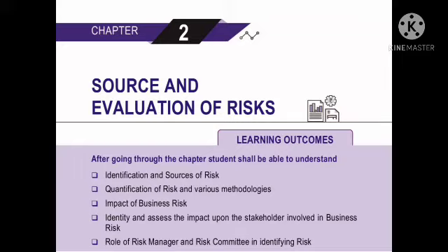2.7 Using the decision-making tree for this risk assessment, the data for the entire tree has to be processed and calculated. The procedure for calculating this is: probability of public event in good weather plus probability of public event in bad weather, i.e. good conditions plus bad conditions, equals 0.40 x 0.70 plus 0.60 x 0.30 equals 0.28 plus 0.18 equals 0.46. This can also be translated as a 46% probability for a public event.